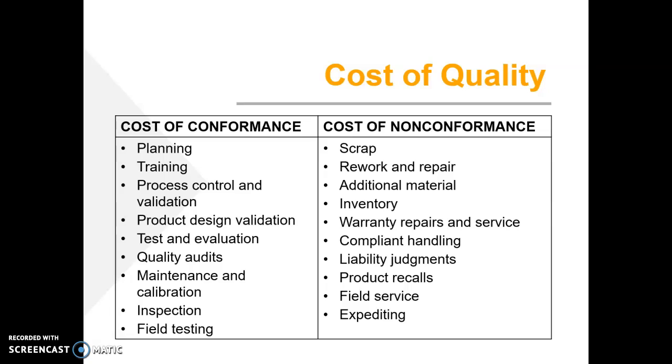It's going to cost you money to issue repairs for warranty work. You're going to have to deal with unhappy customers and their complaints. You might even face a liability in a lawsuit. You might have to issue a recall. So there's lots of costs associated with poor quality work. And so a little bit of effort up front will save you money on the back end.